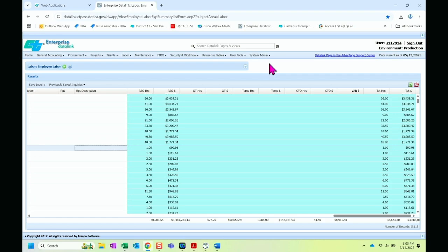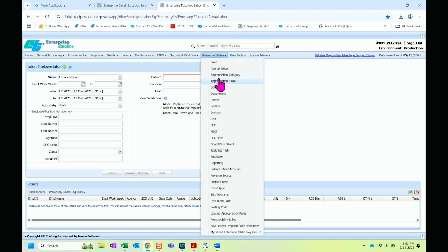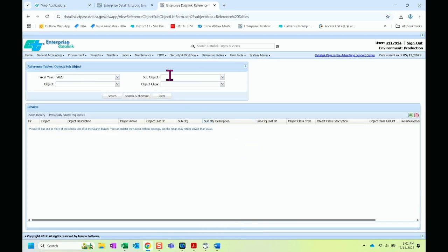For this particular report, is the ICRP included? No. ICRP hits our operating expense, not labor. So anytime 1 hour gets charged and it's a reimbursed project, what happens with ICRP is there's a billing that happens through accounting. It's going to grab those hours, go to that matrix that we showed you, that bulletin, the ICRP earlier. It's going to apply what they call the ICRP rate to bill the locals. And it's going to hit your operating expense budget on your project to object code 093 and 193. So you'll see that on the OE side, not the labor side.